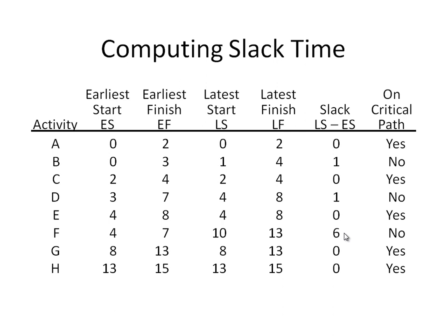While if A was delayed, it has 0 slack. So any delay will push the schedule to the front. So that's the problem. We don't need to push the schedule. Actually, you always would like to come within time. That's why we say these kinds of activities that can push or delay the schedule are called critical activities.